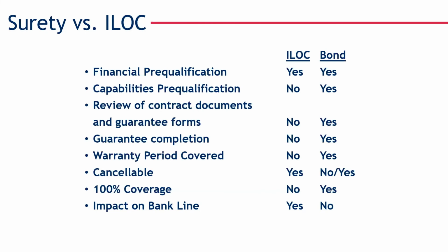Letters of credit are cancelable. Bonds are not typically cancelable. Again, your performance bond is canceled when the performance is done and the contract is accepted. The payment bond exposure is completed when you pay all your bills under that particular bonded contract, and you've got all of those lien waivers and lien releases. You do have tax bonds and license bonds, and some of those do have cancellation provisions, but typically the contract bonds we're talking about today are not typically cancelable.